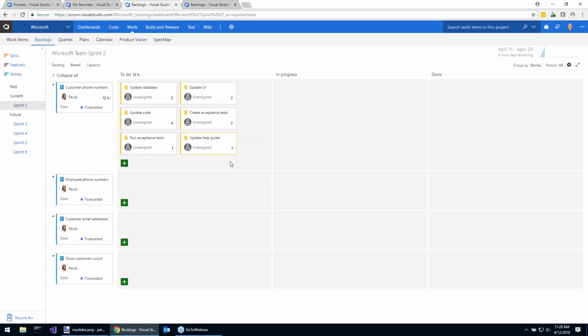So this is all done in that time-boxed sprint planning event, 4 hours or less for a 2-week sprint on average, in which case you would do what I just did here, create these little cards, these tasks for all of the items in your forecast here. And then after the sprint planning is over, you've got your forecasted work on the left, you've got your plan to deliver it, and some kind of a goal that would wrap around a short narrative that would wrap around these 4 items on the left here is what we're delivering this sprint.